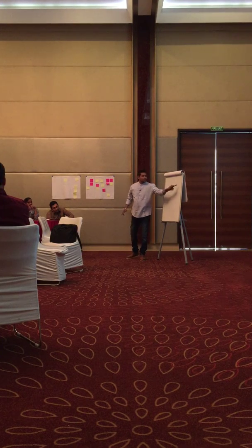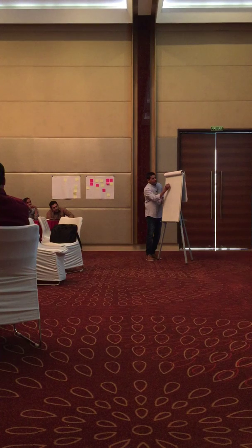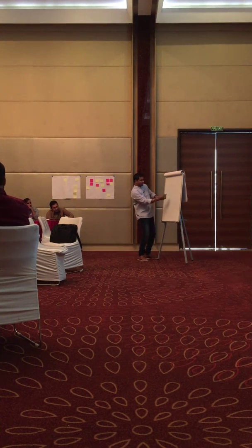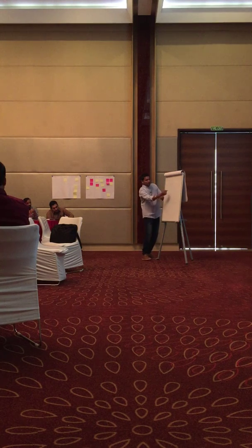What are these S1, S2, S3, S4? Stories. Now, S1 may be a new feature, S2 may be a defect, S3 may be a defect, S4 may be a new feature. Agree? Now, a defect may not need a code review. The team can agree. So, what you can do is, code review for defects is not mandatory, so optional. Remaining all are required. So, you put it like this.